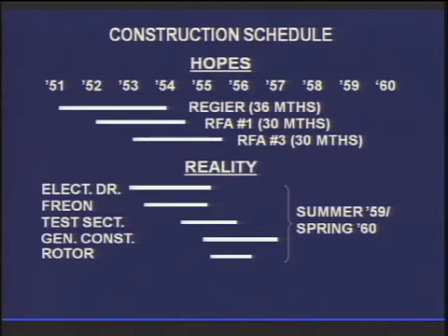What happened was that the major contracts weren't issued in the proper sequence. They were issued when the drawings and specifications were ready. And the time period for the contract was the time it would take to do the work if the work was totally independent of all the other work. Well, you can see that that's not going to work.